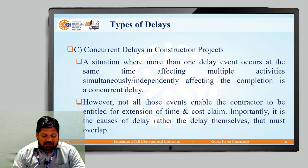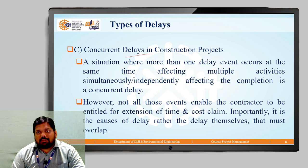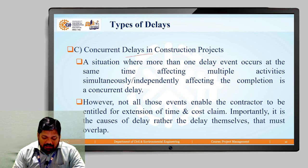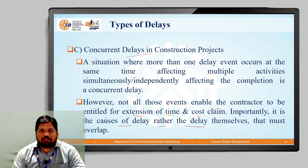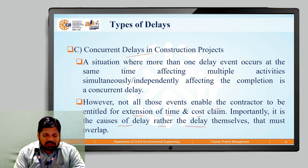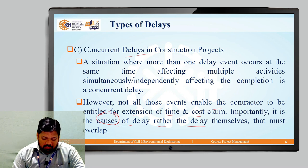The next type is concurrent delay — a situation where more than one delay event occurs at the same time. For example, critical delays along with excusable delays happening simultaneously. Not all such events entitle the contractor to an extension of time and cost claim. Importantly, it is the cause of delay rather than the delays themselves that must be understood, as one particular cause may lead to multiple delays.